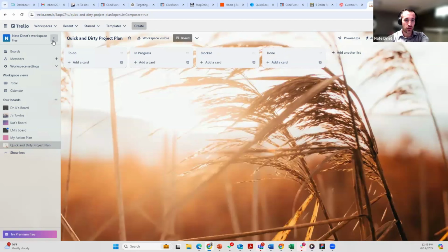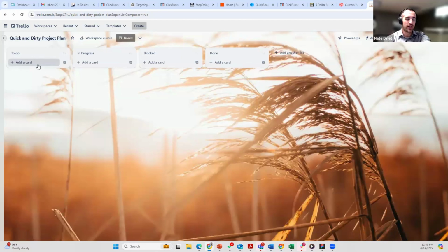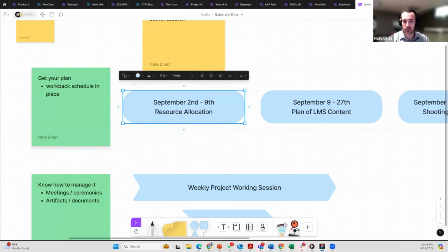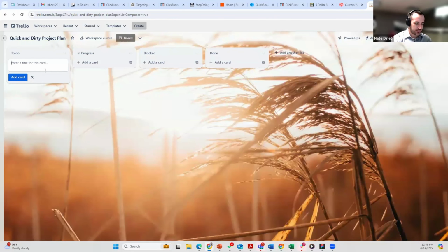All right, so this is how you would manage this project. You have tasks that are in to do, in progress, blocked, and done. Easy enough, right? So let's say you want to add a card. What was our first milestone? Let me go back to this. Our first milestone was resource allocation. So let's have: determine who our filming vendor will be, who internally is on this project, and who our stakeholder is. These are all things that we need to answer and do.